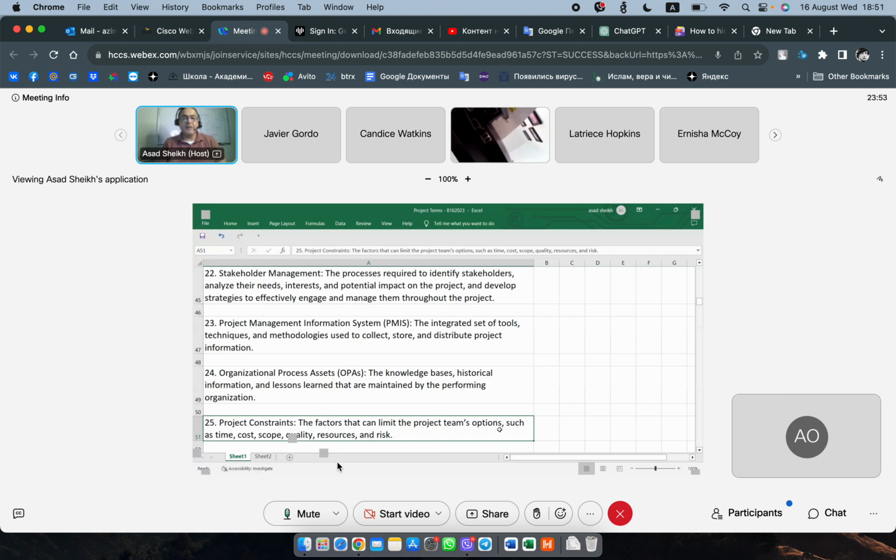I mean, let's say you're given a project, and that project is a phase 2 project. So phase 1, somebody else did it. You have to go and look, and you can look up that information, their lessons learned, their schedule, and you can repurpose it for your project. And all of these are assets. All of these are process assets, and they belong to the organization, right? They don't belong to the project manager. They belong to the PMO or the organization.